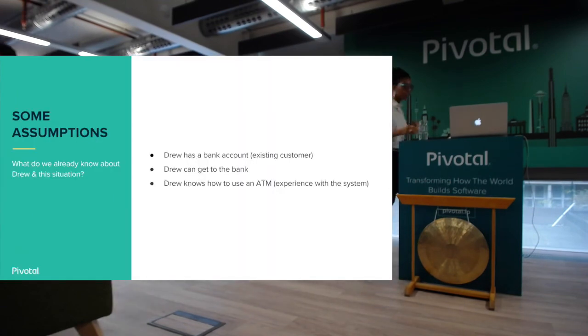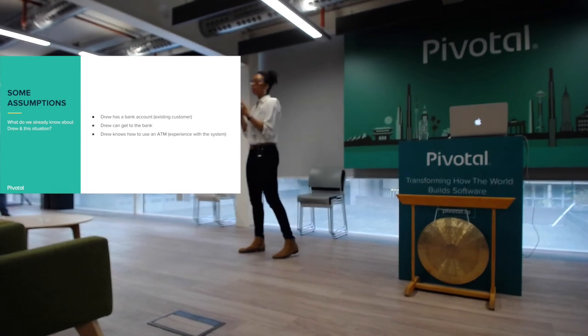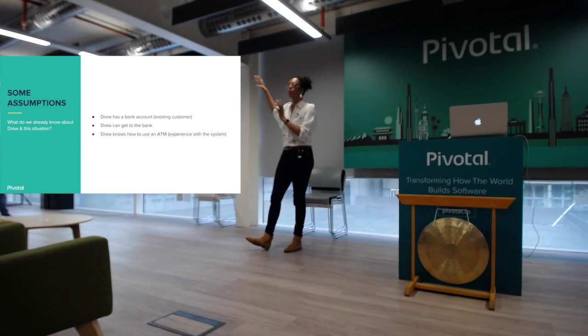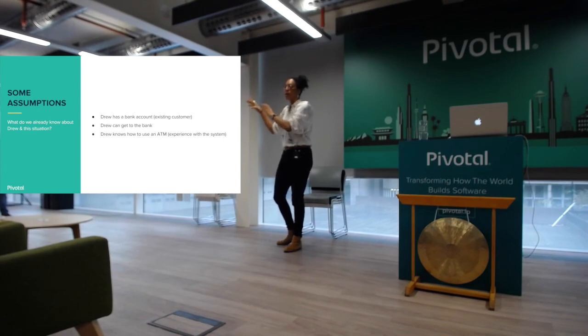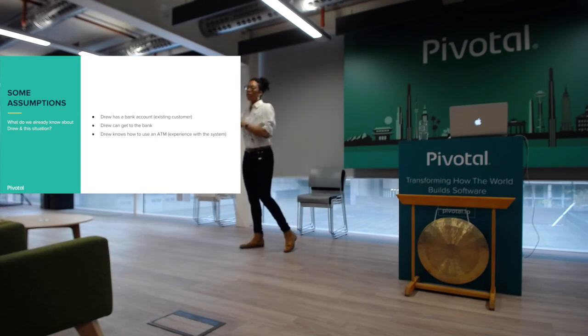So I actually believe it's very important to call that out before you even start the scenario. So the first thing I mentioned was give it a name and call out any assumptions, constraints, risks, what it is and what it is not. Those are all part of the assumptions that I would think would go before you even start to build out the map. So I would take time to say, okay, this is the scope of what we're talking about. This is what we're not. We're looking at this particular scenario, as you can tell from the title. And those are scenario or journey level assumptions.